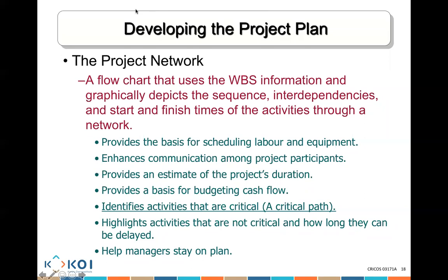And the reason why we create a network diagram is because it provides us with the basis of scheduling. We can know when we need the labor. We can know when we need the equipment to be available. We can make it very clear to everybody else what everybody needs to be doing. So it really enhances our ability to communicate among all of these project participants. It provides an estimate of the project's duration. It provides a basis for knowing the budget, what budget we need at any particular point in time, the actual budgeting information that is appropriate.